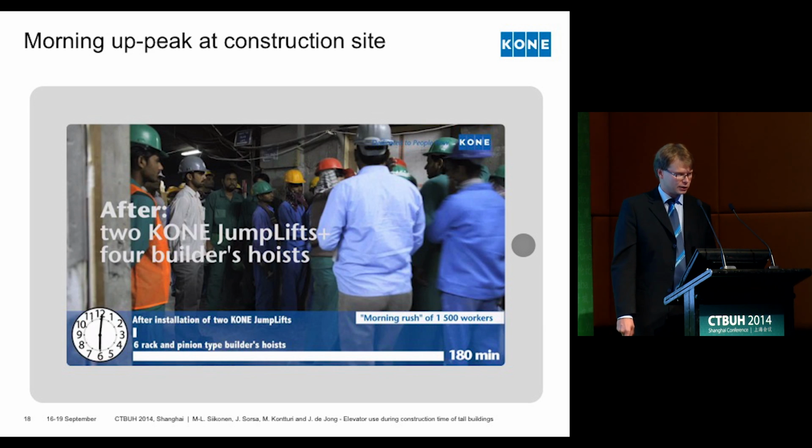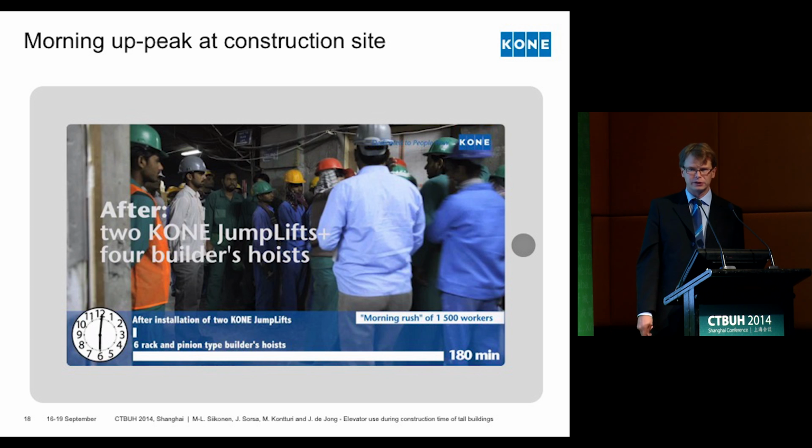Okay, let's go back to the challenge I introduced in the beginning. So on this site, they installed 2 jump lifts to solve this transportation problem. And in this end situation, there are now 4 builders' hoists and 2 jump lifts that are handling the traffic.